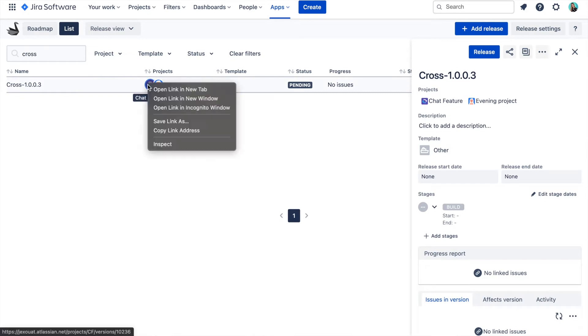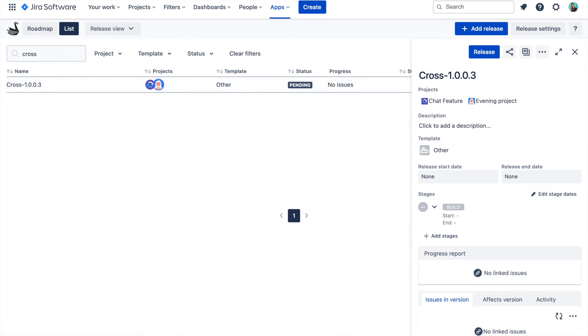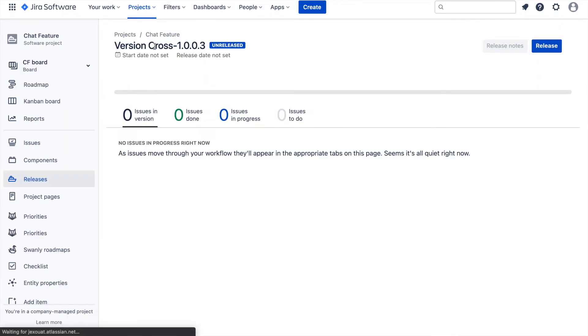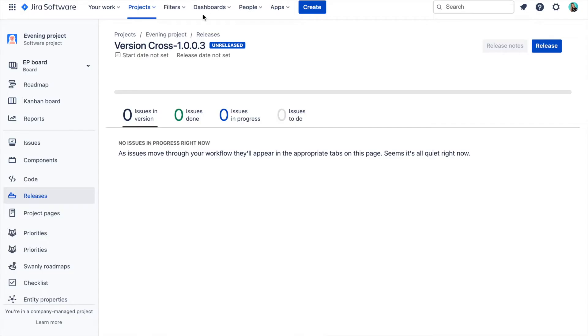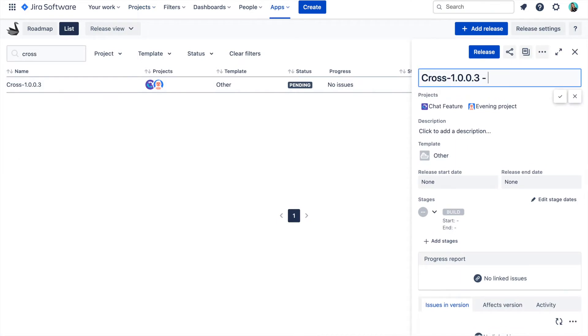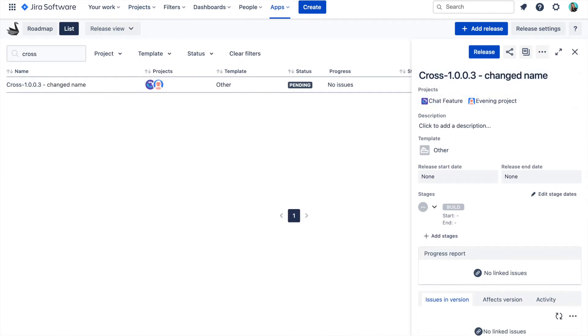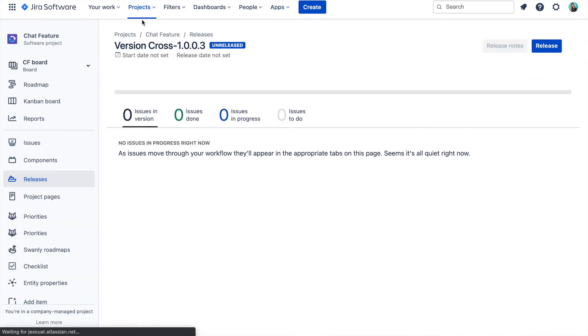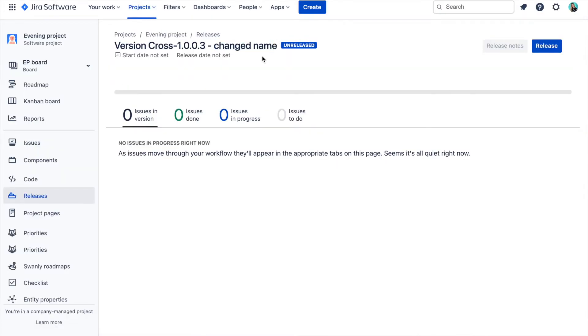After you create a cross-project release in Swanly, in each project that you selected, Swanly creates a version with the same name, description and start and end date. If we would then go and for example change the cross-project release name in Swanly, this change will be reflected in all these project versions too.